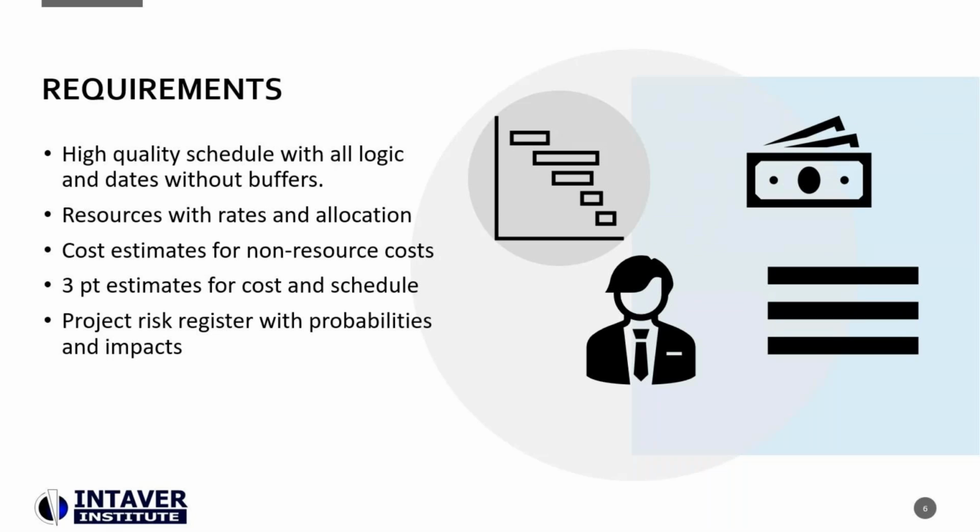That means you're looking at minimizing hard constraints, bad logic, and dangling activities, ones that don't have successors or don't have predecessors. Do anything you can to bring that up, because if you have a lower quality schedule that doesn't update properly, the schedule part of your analysis may or may not be valid.